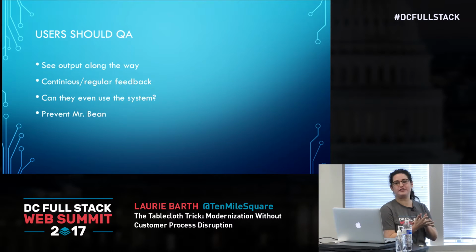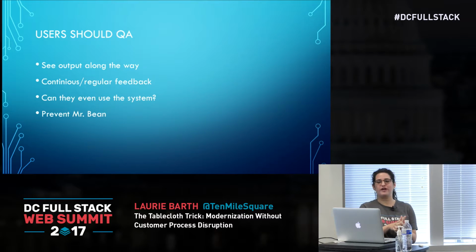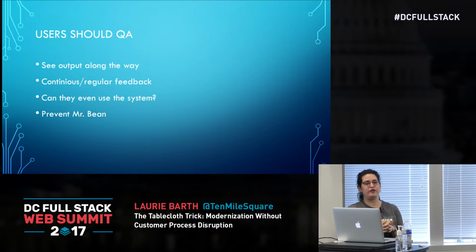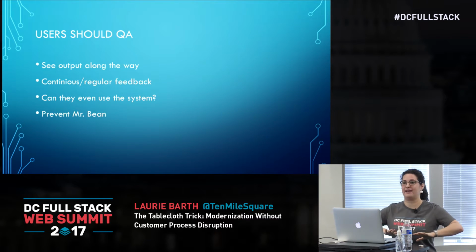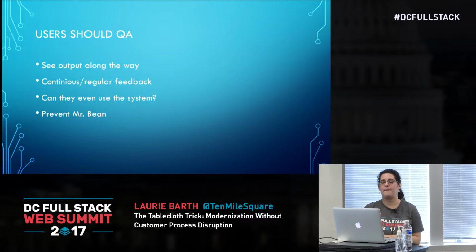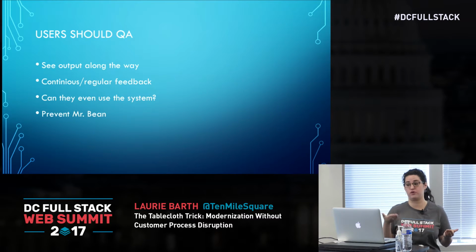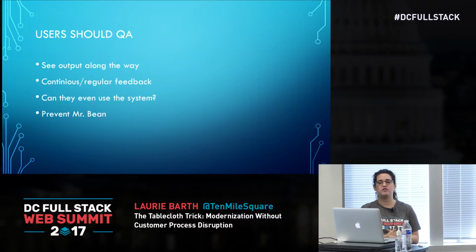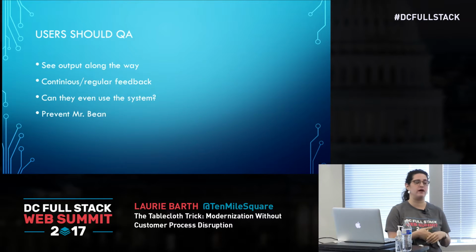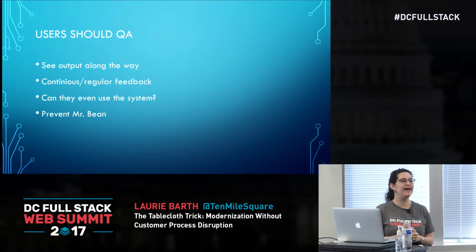Your users should QA. The horror story I just told you is that the users didn't know how to use the system once it was put in front of them. And yes, I know training is a thing, but having them part of the QA process means that they're more likely to find something that doesn't make sense within their process sooner rather than later. And they'll feel comfortable knowing how to use the system from early on, and you can tweak things. And then you won't see Mr. Bean going up there being like, I'm super confused.